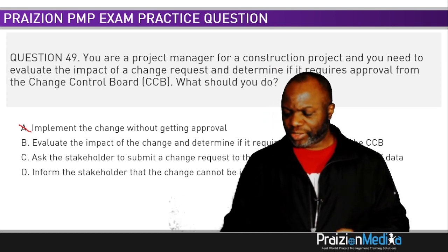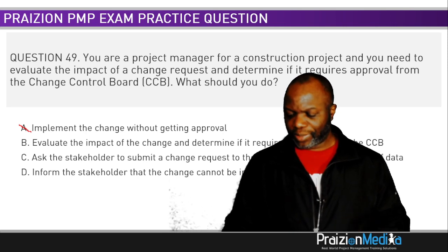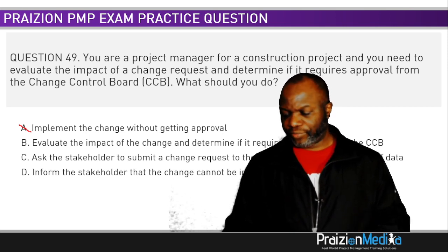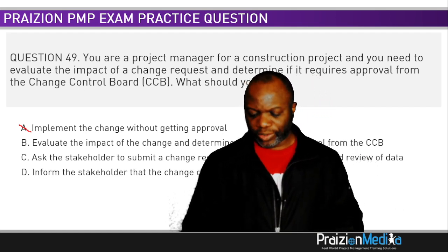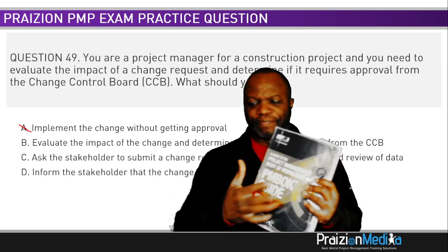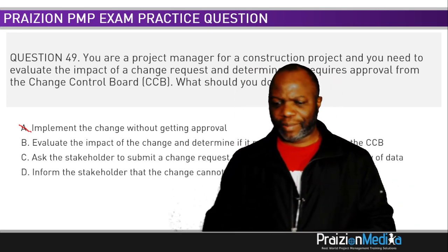The perform integrated change control process includes a change control board, which is a formally chartered group responsible for reviewing, evaluating, approving, deferring, or rejecting changes to the project and for recording and communicating such decisions. So there you have it. PMBOK 6 has some good information about that.